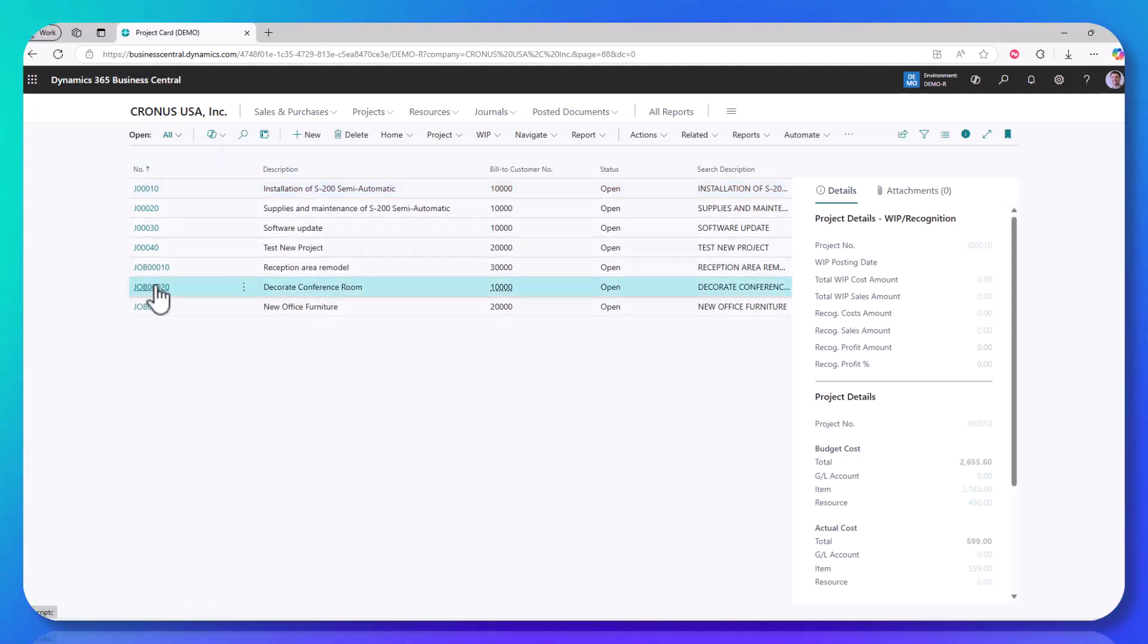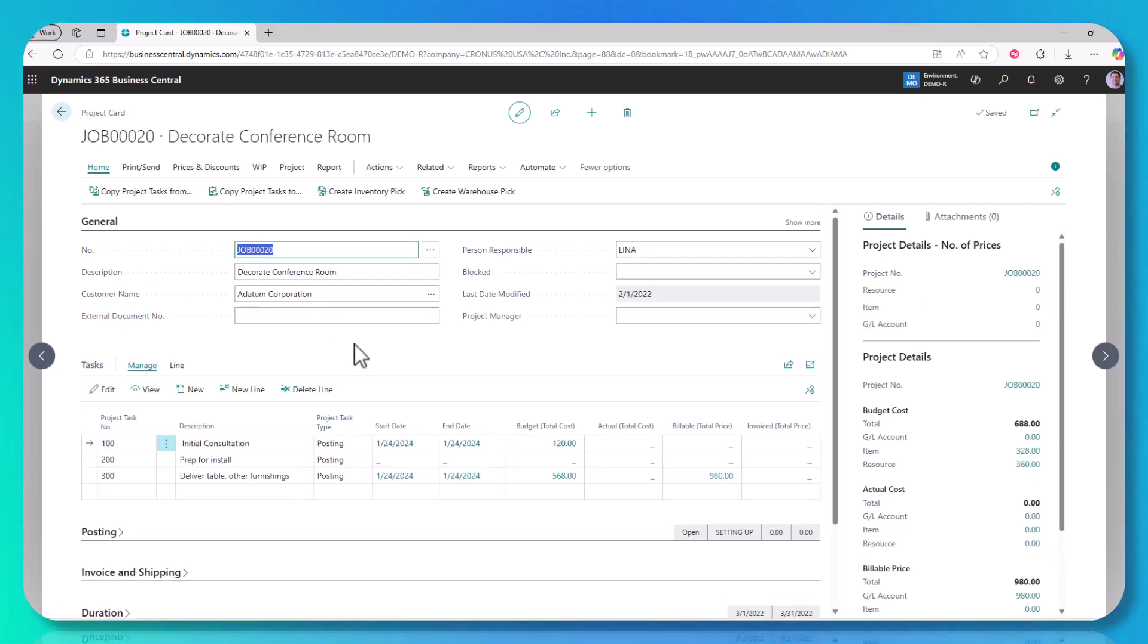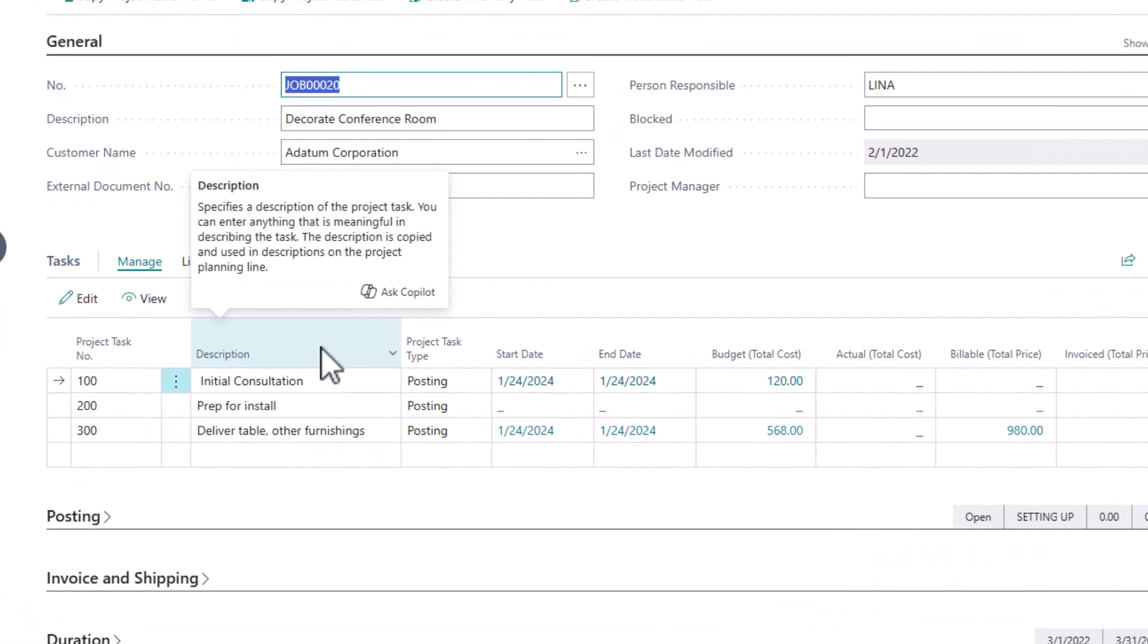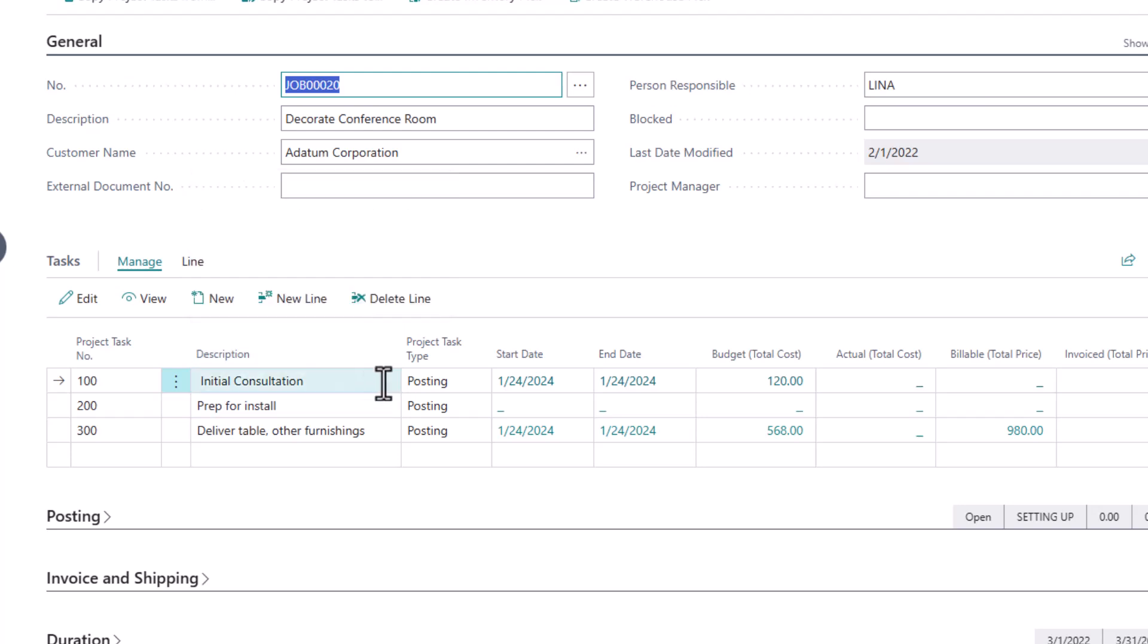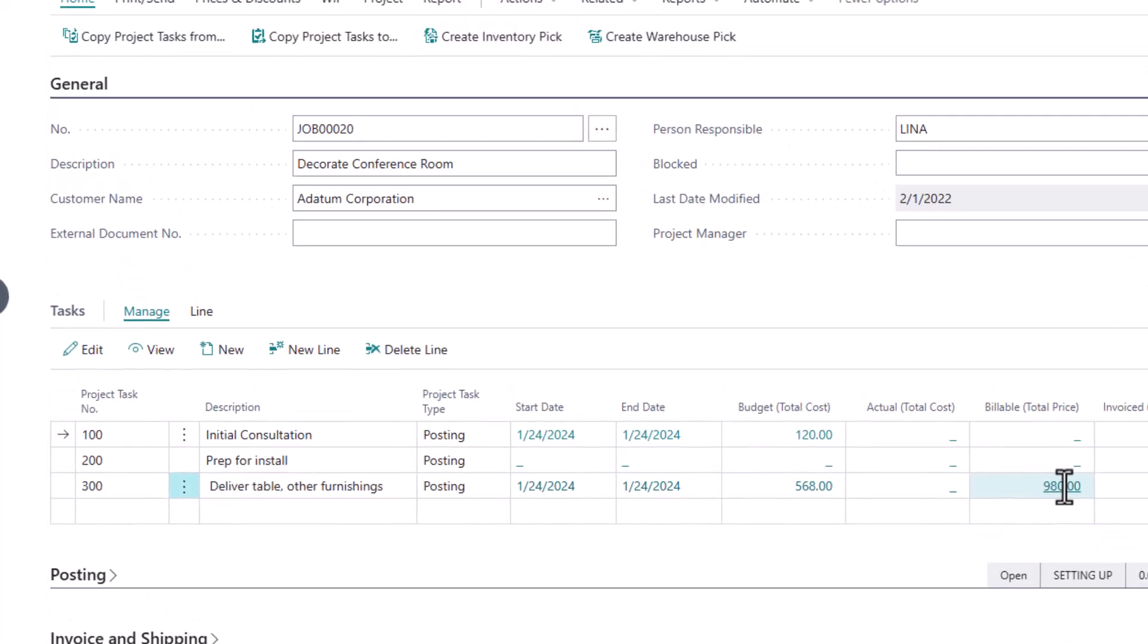For anybody that's unfamiliar with the project capability, you plan out different tasks and then within each task are the people, the machines, the subcontractors that are going to perform the work, and that builds up your cost estimate. And then either in a single contract and some milestone billing, time and material type billing, you bill for the events on that project. So in the case of this project, we have three tasks, we have some cost, and then we have one billable event that is going to take place.